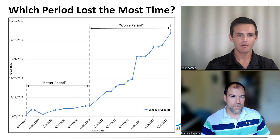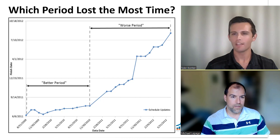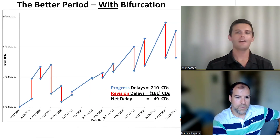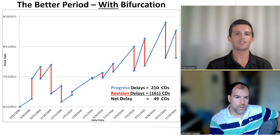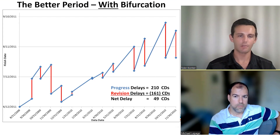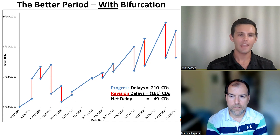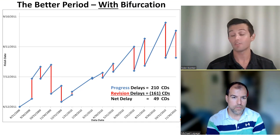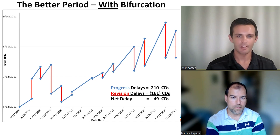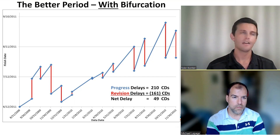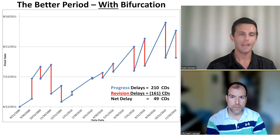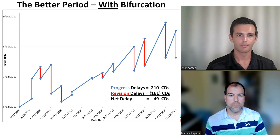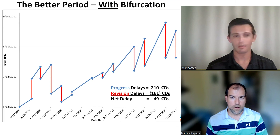You may be surprised by what you don't see from a graph like this, just looking at the completion date of a project month over month. Let's talk about a concept called bifurcation in our schedules and in our monthly updates. We have two categories of delays or potential recovery. We have progress delays, and that's going to be associated with actual starts, actual finishes, and changes in remaining duration — those three things and those three things alone.